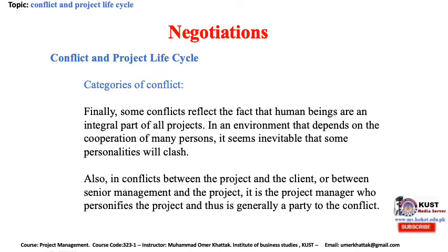The three types of conflict seem to involve the parties at interest to the project in identifiable ways. The different goals and objectives of the project manager, senior manager, and functional managers are a major and constant source of conflict. For example, senior management is apt to fix all three parameters of the project: time, cost, and performance, and then to assume that the project manager will be able to achieve all the preset targets.